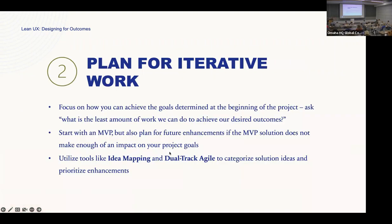The second way to begin practicing Lean UX is to start planning for iterative work. Focus on how you can achieve the goals determined at the beginning of the project. Ask yourself: what's the least amount of work we can do to achieve our desired outcomes? Start with an MVP and plan for future enhancements in case the MVP doesn't meet your solution goals. You can also utilize tools like Idea Mapping and Dual Track Agile to categorize solution ideas and prioritize your enhancements.